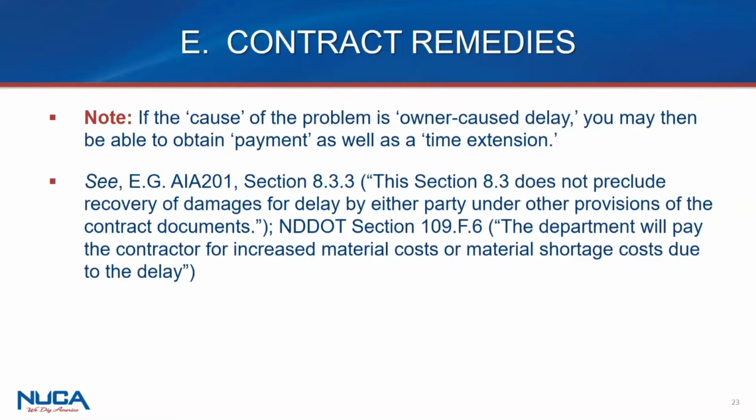Yeah. And before I do that, I want to follow up with an important point you just made, Shawn, which is whether it be because of material delivery delays or otherwise, the critical thing is to follow what the contract says procedurally, give notice of it right away, and request a time extension. And as Shawn said, if you're not granted that time extension and you incur extra costs that you otherwise wouldn't have incurred, you have a right to get paid for that under the theory of constructive acceleration.